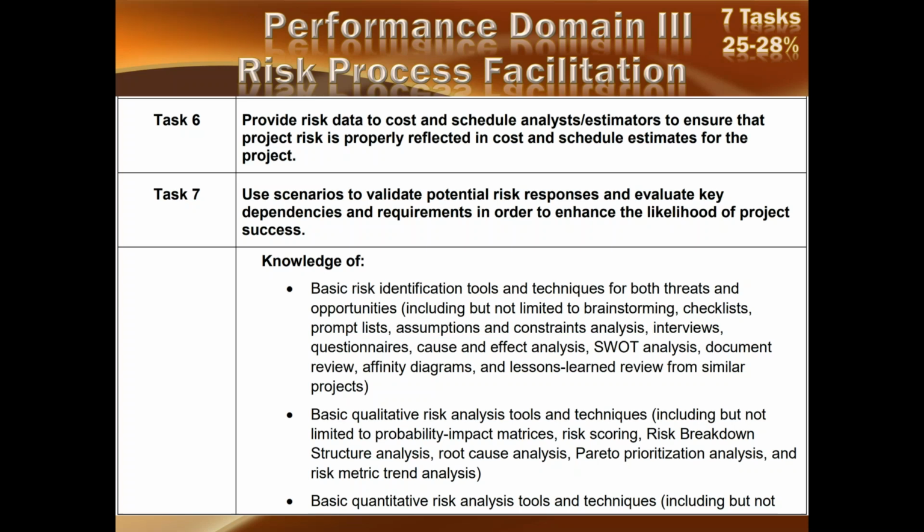Task number 7, use scenarios to validate potential risk responses and evaluate key dependencies and requirements in order to enhance the likelihood of project success. Use scenarios means that you have to conduct what if scenarios and you have to pose various situations to yourself. What if this occurs, then what will I do? What if this occurs, then what will I do? So you will validate the potential risk responses which could have been taken in a specific scenario. At least they must be recorded and evaluated, their key dependencies established and the requirements of that in order to enhance the likelihood of project success.